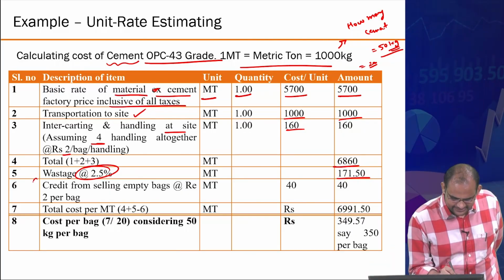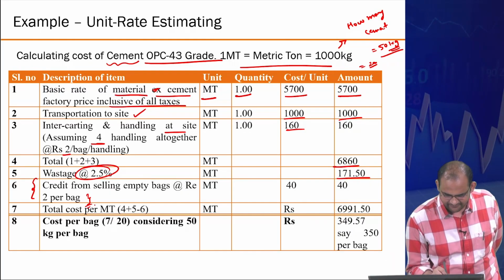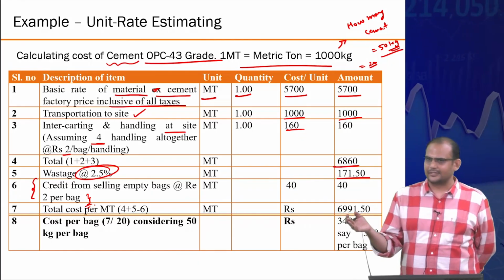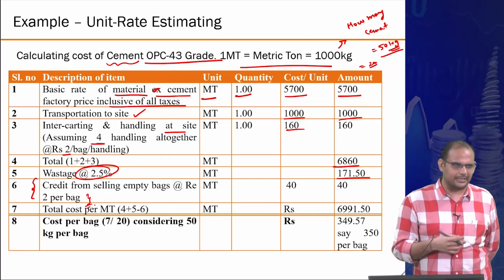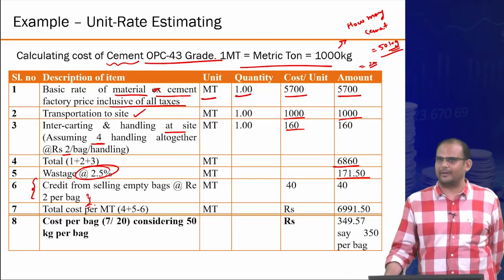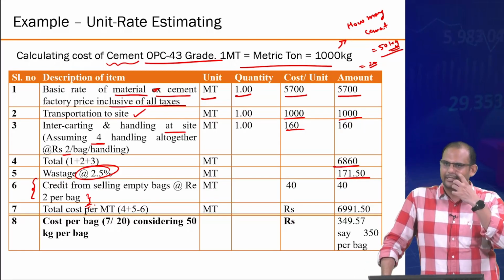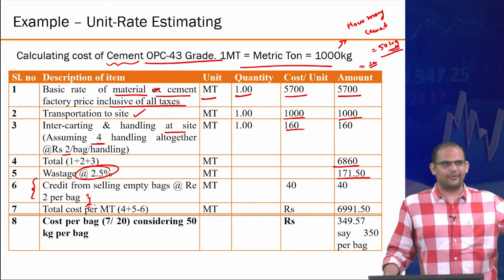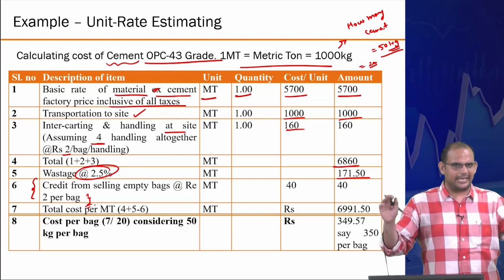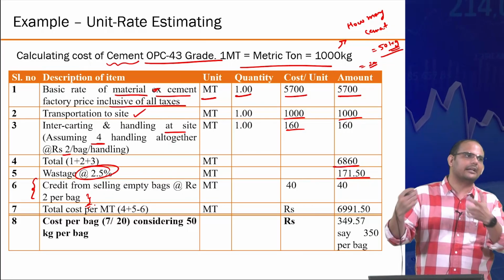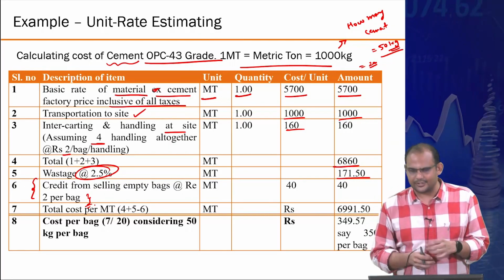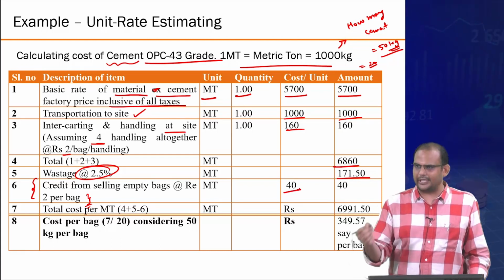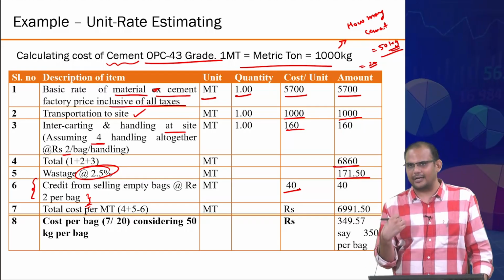This is a very interesting Indian concept, where the empty cement bag can be resold. There's a market for that, people will pay for this. So if you keep the bag in a reasonably good quality, and it has been opened from a very specific area, and you can easily reseal it and use it again. So it has a market. So that has 2 rupees per bag. So you actually get 20 into 2, 40 rupees back out of this.